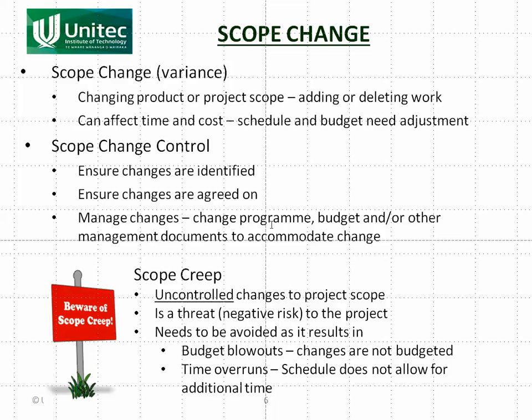Once the client has agreed on it, you change the program, budget, or the other management documents to include that change. So you might add another week to the program, you might add another $10,000-$20,000, whatever it is, to the budget. And now the revised program is the new program, and the revised budget is the new budget. So when you say you're bringing the project in on time, it may be that there have been a whole lot of changes, and that the amount of money you spent at the end of the project is more than what was planned for initially, and that's fine because you will have changed the budget as you went along, so you can still say that you put it in on budget.